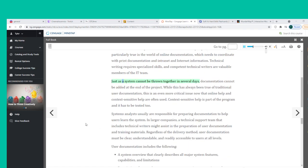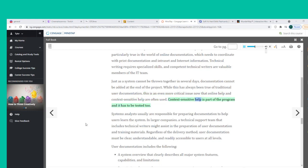Just as a system cannot be thrown together in several days, documentation cannot be added at the end of the project. While this has always been true of traditional user documentation, it is an even more critical issue now that online help and context-sensitive help are often used. Context-sensitive help is part of the program and it has to be tested too.